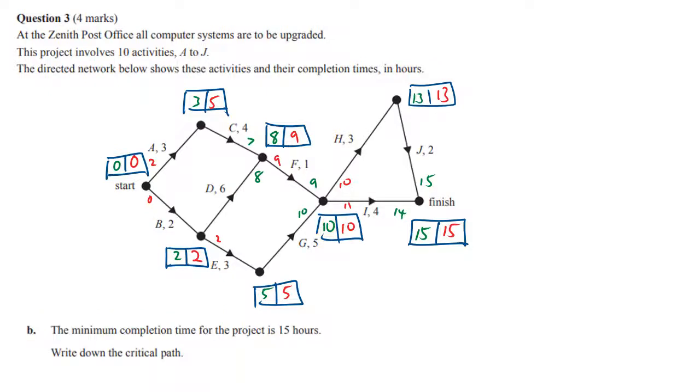We're going to find the minimum completion time. That's a code phrase that basically means we're doing critical path analysis. For the project it's 15 hours, we did get 15 so we haven't made any mistakes so far. The critical path is where there's no float, EST and LST are the same. We're going to join up all those boxes, which means we're including activities B, E, G, H, and J.